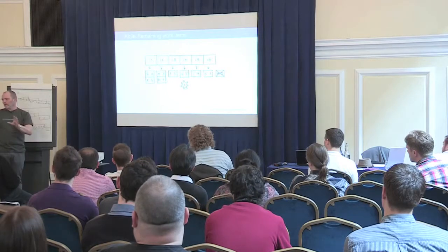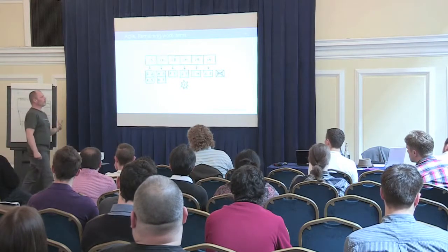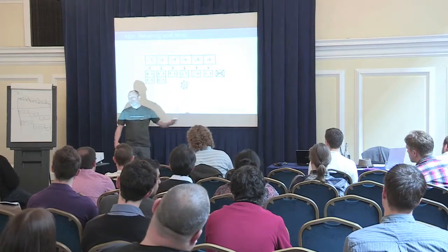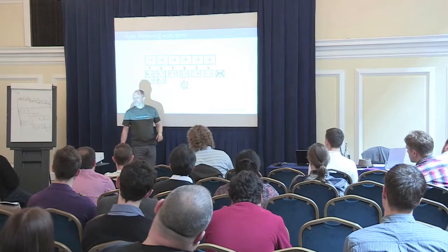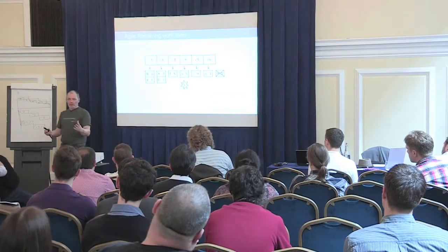So we never did the last use case, and we delivered on time. So that's one way of dealing with it. The other way of dealing with it is that, well, you might say if you do not have a fixed deadline, you could say, well, if there's still useful functionality, we could add a new iteration, right? So new iterations cost money.